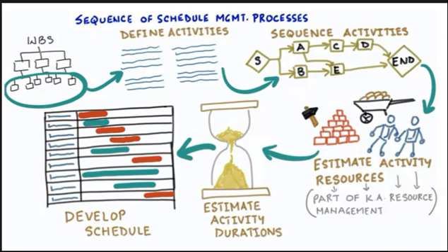At the end of the day, we would end up with something that is more realistic. Now, the schedule that is produced through these steps is approved by the managers or the sponsors or the guiding committee or whoever is in charge of the project approvals. And once it's approved, we finally arrive at the time baseline. And the baseline forms the reference point against which schedule control is carried out to see whether the project is ahead of the schedule or behind.